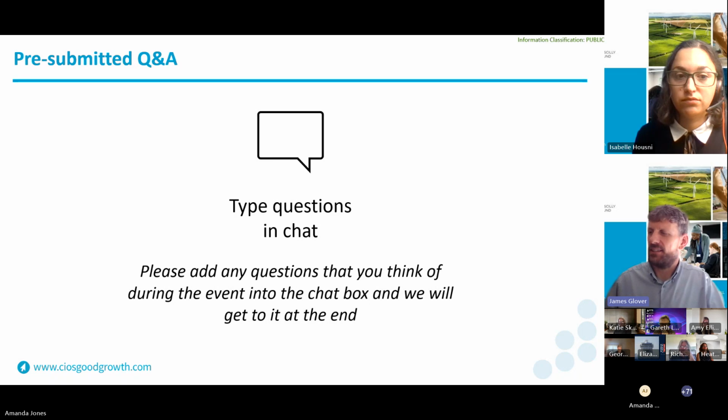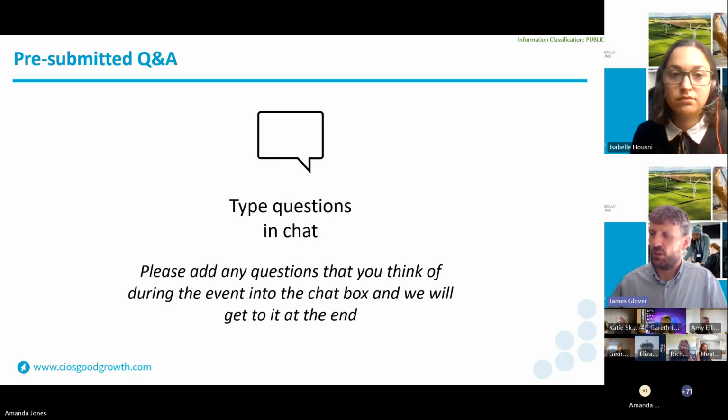Yeah, so the normal process is that the first advance is defrayed in full at the project intervention rate as per the grant funding agreement or your advance agreement. If the spend hasn't been fully defrayed, you'll have to add additional information on the email accompanying the claim. This should set out the invoices received and yet to be defrayed on your financial system, and/or an update of your cash flow or a list of invoices expected prior to the next submission. This will be checked to ensure that we can release the full advance. Otherwise, we reduce the next advance by the underspend on your previous advance. We will let you know if the payment is reduced.